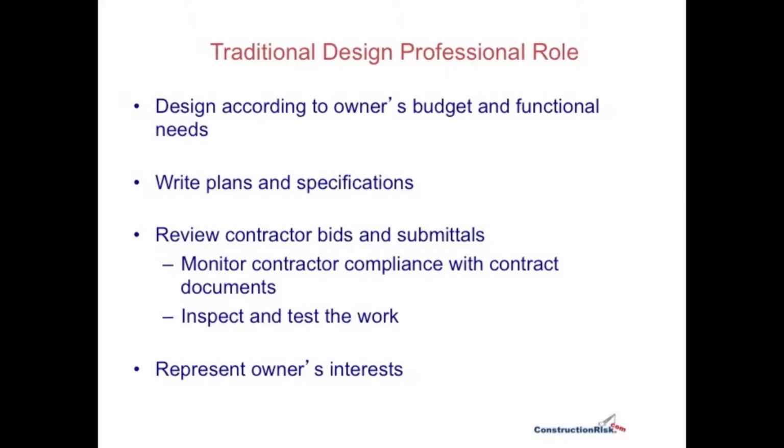When the contract bid comes in, the designer may review the contract bids and the submittals, and then once the contract is awarded, we'll have an ongoing role very often of monitoring the contractor's compliance with the contract documents, may monitor and review the contractor's work to determine that it's meeting the plans and specifications. The designer is representing the owner's interests.